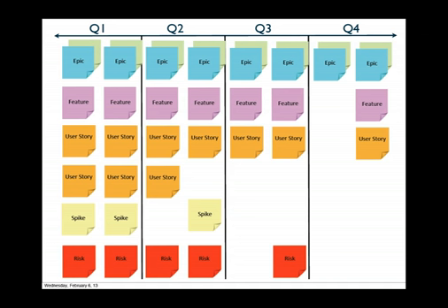If we can't get to a place where we're identifying risk proactively and we're putting stories into the backlog to deal with that risk, our delivery cadence and our ability to integrate across teams is never going to stabilize. So maybe if there's just one or two things I want you to take away, this is one of them. Just enough forward planning to identify risks and to plan to mitigate those risks in either earlier sprints or earlier releases is absolutely huge.